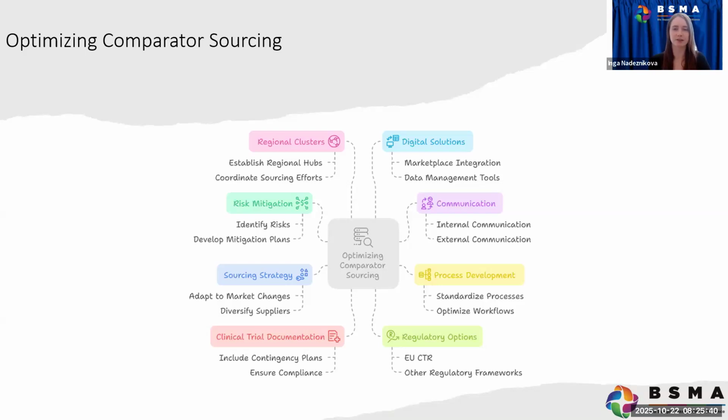So there is some intelligence behind the tool. When this initial assessment is done, which can be a year up to 2 before the trial is starting, we are also asking our suppliers, okay, the tool suggested these presentations. Can you do an actual market assessment, so market intelligence, on which are the most available presentations, which backup presentations we should be selecting, because it's something that we've learned